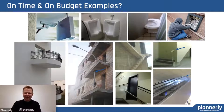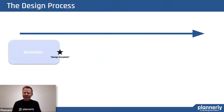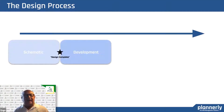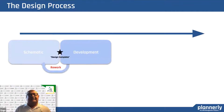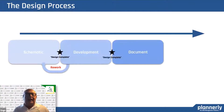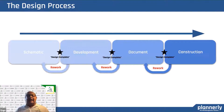There are a few comical examples of what has actually been constructed to plan. The design process is aspirationally a linear process — supposed to start with schematic design, then launch into DD, 50% DD, 95% DD. But the problem is the owner changes his mind and we're back into rework, looping, with a deadline to meet. We finish DD, move into the document phase, and have to rework again while construction has already launched. It isn't very linear.